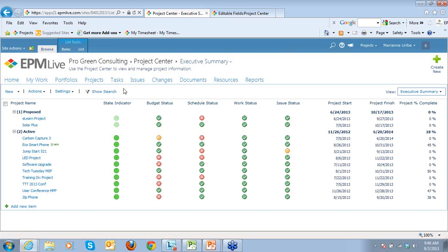However, at some point when you do have those details, it's recommended that you use the schedule-driven method so that there are no discrepancies between the schedule, the view form and our reports. Not only that, it is recommended that you use the schedule-driven method once you have all the details because your schedule should be the driving authority of your project information. So let's go ahead and change that method. Now I'm going to select this.